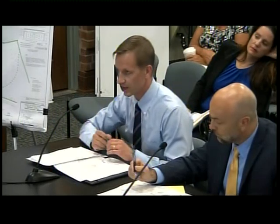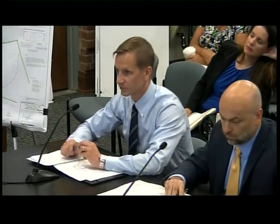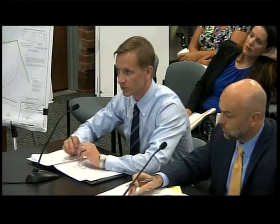And the waiver for the 100-foot setback for the septic systems. We have been granted the Board of Health approvals. The small shift in the septic system on Lot 1 will require us to go back to the Board of Health, but we have spoken to the Board of Health agent, and he's comfortable with the revisions we've made, with an additional test pit done at the time of construction of the septic system. So we'll be submitting revised plans to the Board of Health.